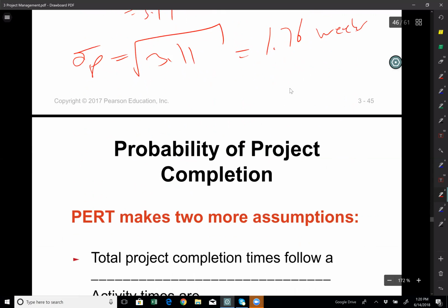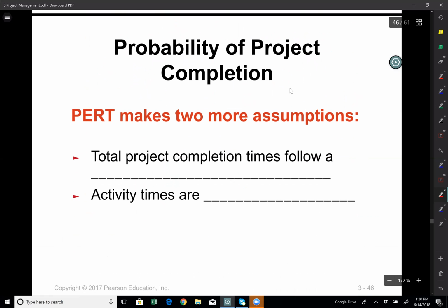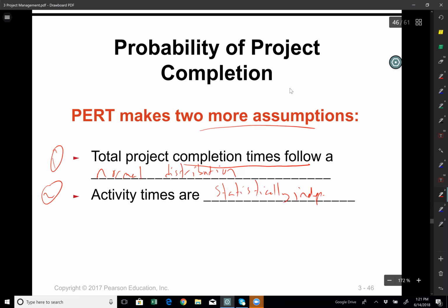For this project. All right, so PERT makes two more assumptions. One is project completion times follow a normal distribution. Two, activity times are statistically independent. And this is a big assumption right here because I know that the time completion for an activity, let's say D,